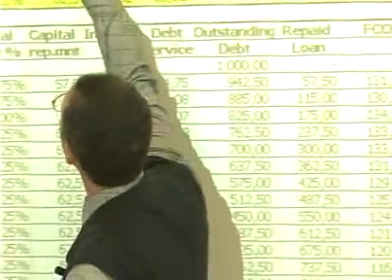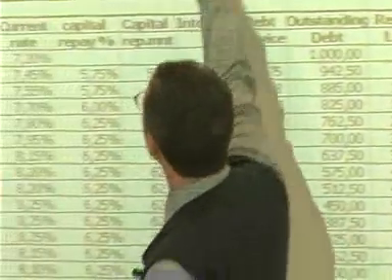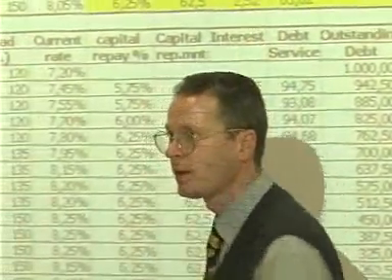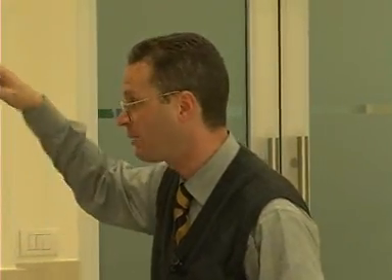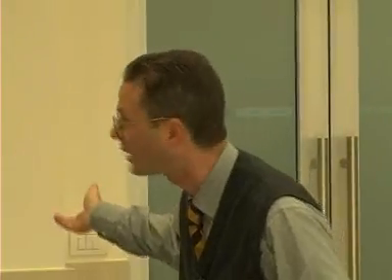And so this depreciation schedule is an Italian depreciation. The capital that is repaid every year is fixed. It is 6.25%. You can easily see from this. If you pay 6.25% plus 6.25%, so 12.5% in a year, you will depreciate your loan in 8 years. 8 times 12.5 is 100.